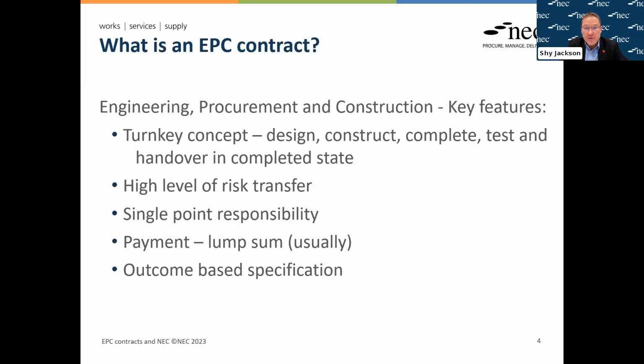They come in many different forms. They apply to many types of projects. I've seen NEC contracts being used on them. FIDIC has the Silver Book, and we also come across many bespoke versions being used, all for EPC contracts. And I think a bit of a general reminder before we start is that, like with any project, you need to decide what you're trying to do first: what's the delivery strategy, risk allocation, payment structure, and then choose the appropriate contract form, not do it the other way around.